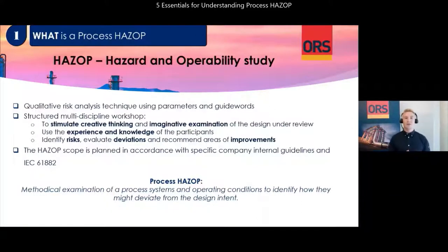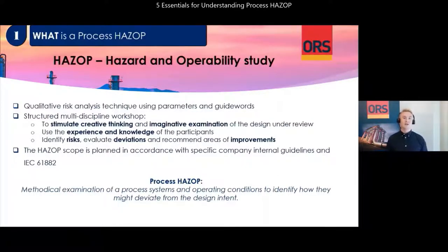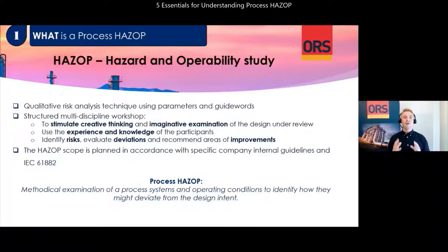An important distinction: a process HAZOP considers process-related hazards, meaning hazards that can occur due to the process design. For hazards purely related to working environment and work-related accidents, and for non-routine tasks and operations, a safety job analysis is more suitable. For hazards related to external events such as earthquakes, dropped objects, and impacts from vehicles, a HAZID is more suitable. For a thorough investigation of various specific failure modes of equipment, an FMECA is more suitable.